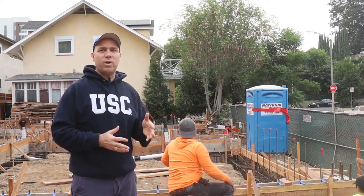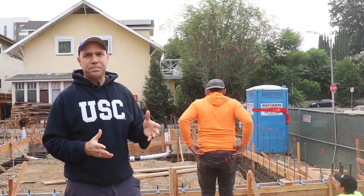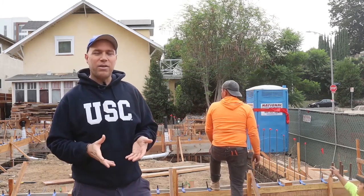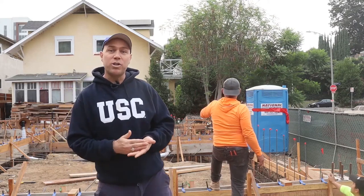Nothing you can do about it unless you wanna wait a few months, and that's not gonna help because of all the buildings that burn. There's a concrete shortage in California. I'm lucky that I found concrete today. I had to call all around and some of them were telling me they could only give me a partial order.